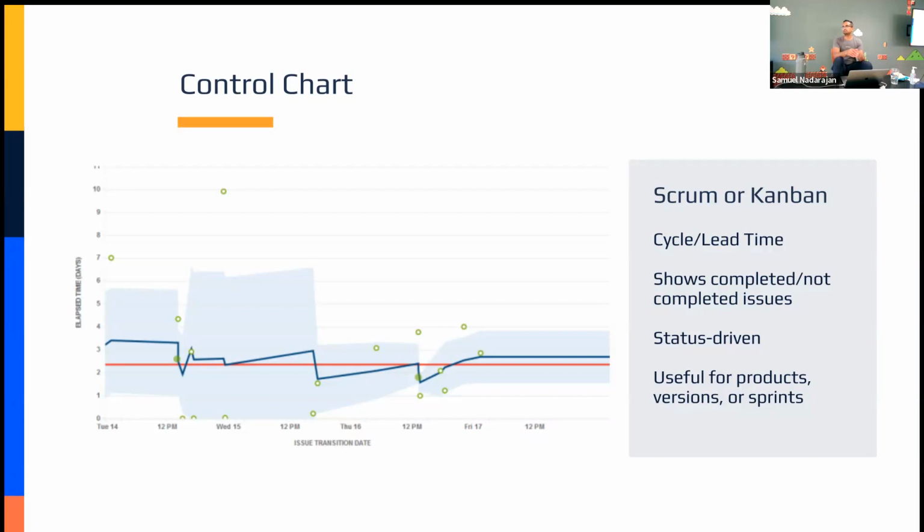Right. Yeah. With this chart, where does lead time show up, how do you read that? Or does this example have lead time included? So for this screenshot, it doesn't show lead time. Remember, lead time and cycle time are just based on the statuses you include in your chart. So if I wanted to look at this control chart specifically for lead time, then when I'm generating this report, I would select the status that's mapped to my leftmost column. Oh, okay, so you look for one or the other. Yeah. So then the whole blue section would either include lead time or wouldn't. Yeah, it depends on what you configure the control chart to show you.